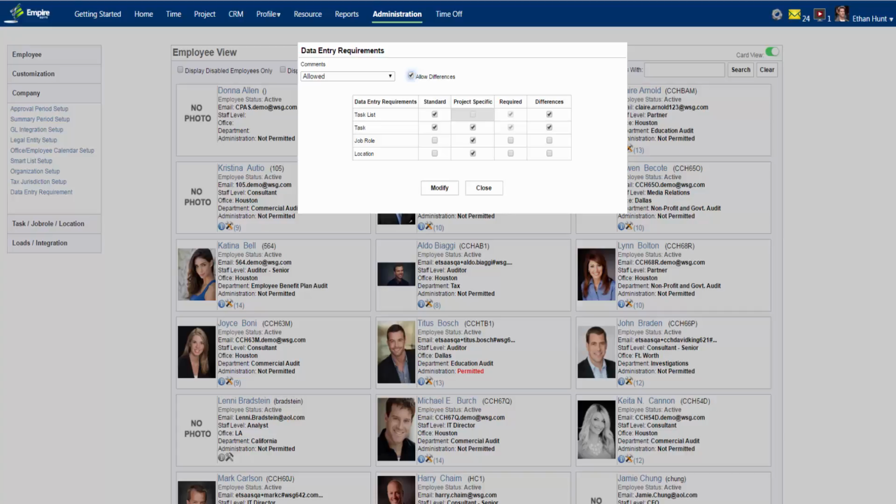With regard to the task list, there are two types of tasks, standard and project. When you generate a list of project tasks, you can generate it based on a list of standard tasks. That allows them to track a standard task as a project task and report on it based on metrics such as number of hours worked and estimated costs for that particular project task. In most cases, people actually generate project tasks from their standard tasks, but you can create new tasks as well.